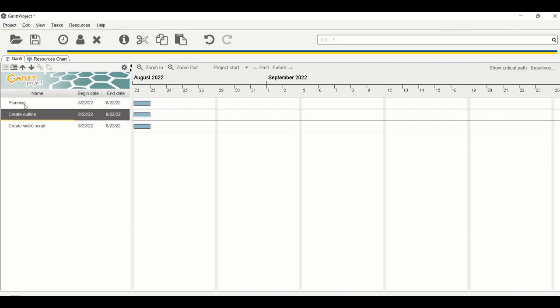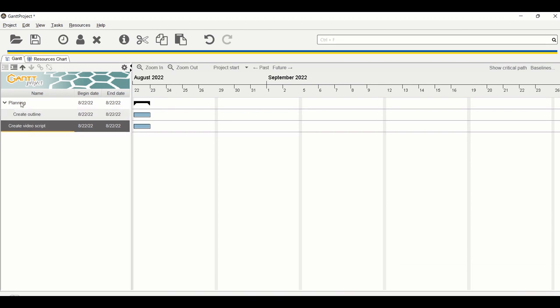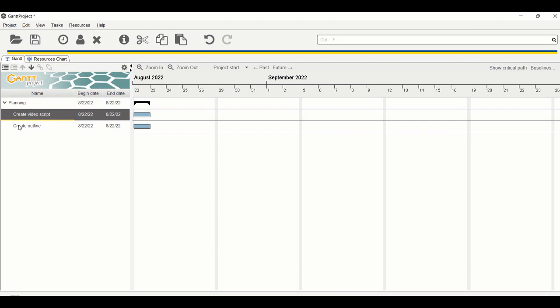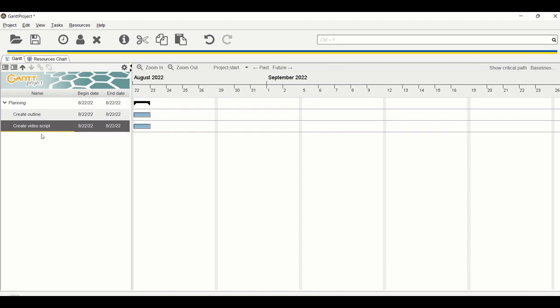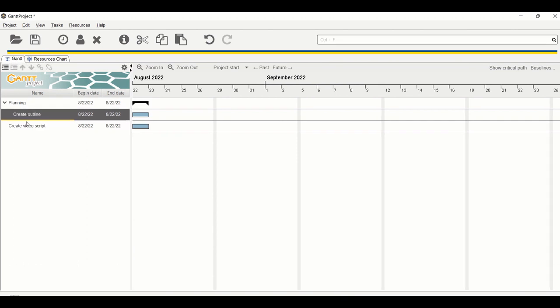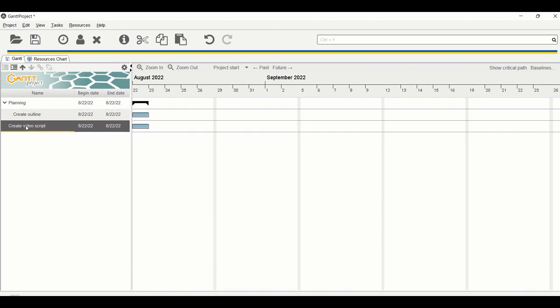There are two ways to make tasks children of Planning. One is to drag the task under Planning — this tells GanttProject that 'Create Outline' is a child of Planning. The other way is to click on the task itself and use the promote or demote options. Move 'Create Video Script' up and demote it under Planning as well.